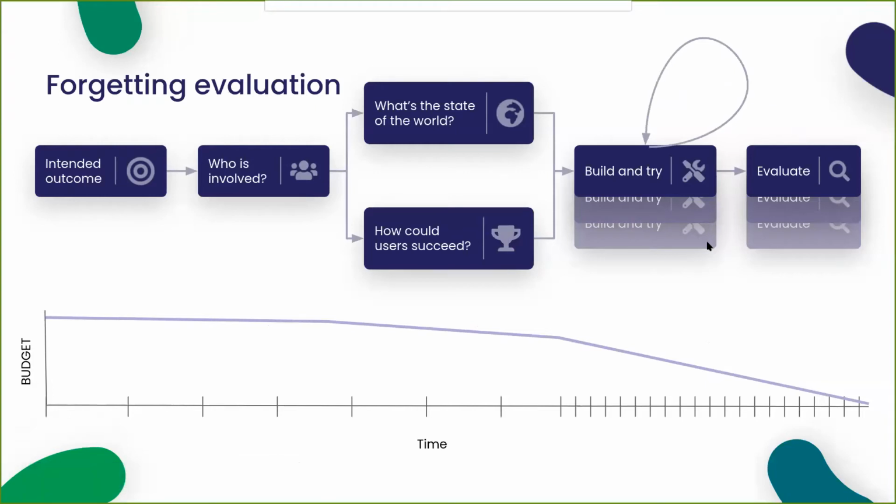There's nothing complicated there. If we forget evaluation and we just keep building and building and building, your budget still goes down, right? And you may come to the end of your project and think, perhaps we should evaluate so that we can report on what we've done to a funder or something. At this point, your time and your budget is finished. You can't improve on it anymore. Learning and improvements have to be applied in a different project or a different phase, which is quite sad.